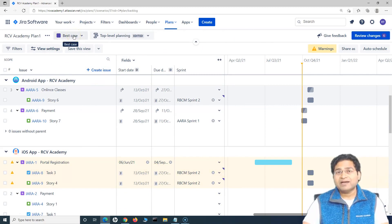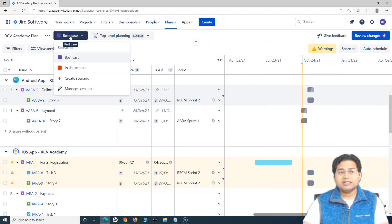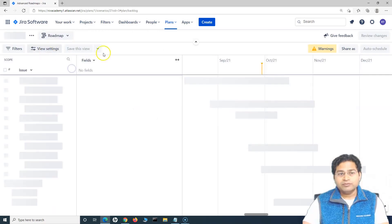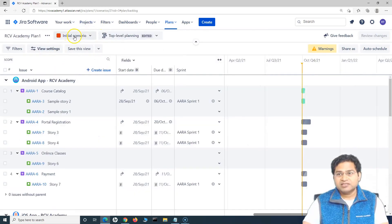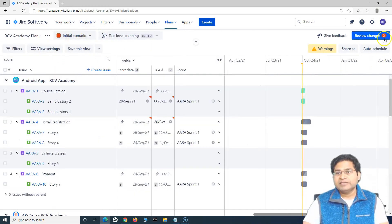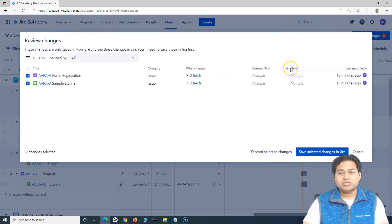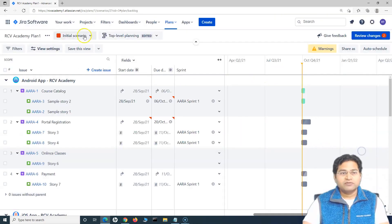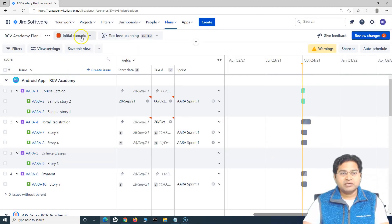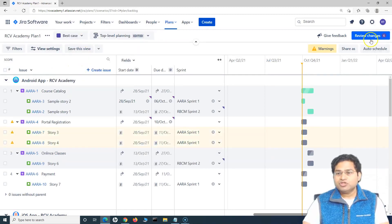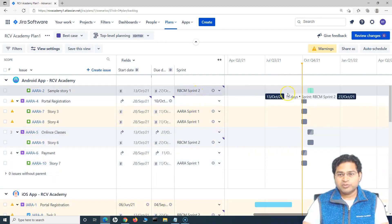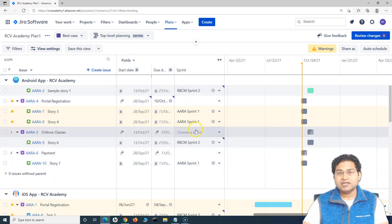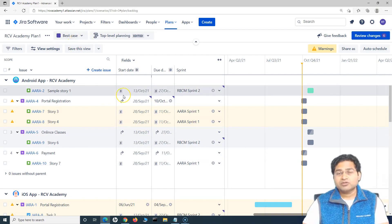Once you have done this best case or this all planning only remains in this particular scenario. It doesn't go back and update into the Jira issues by default unless and until you select a scenario. For example, I select this initial scenario and then click on review changes and publish those changes or save those changes into Jira. If I change this best case now to best case, you'll see review changes still there and whatever details I have chosen. For example, this sprint two, whatever I have chosen, it still persists in this particular scenario.